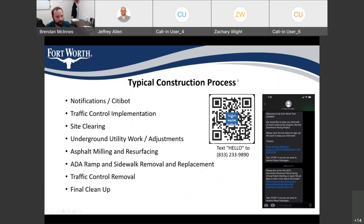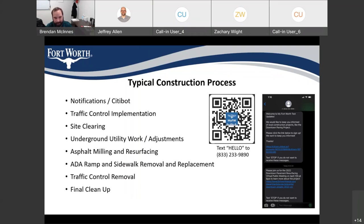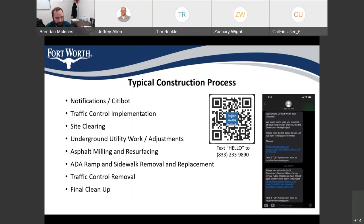A little bit about the typical construction process that you'll be seeing: we'll be doing notifications, including door hangers, and we'll also have some project signs placed out around downtown which will have information linking back to the city bot — this QR code. As some of you may have already signed up based on the mailers for today's meeting, you'll be receiving text messages similar to the one received Friday or this morning, giving a quick update on the project and what to expect in the next couple of days. We'll be trying to keep those notifications ahead of construction so you can see where the work is going to be moving.